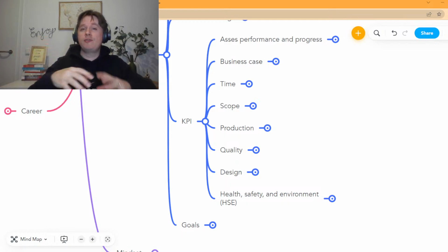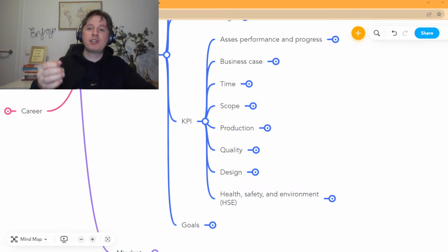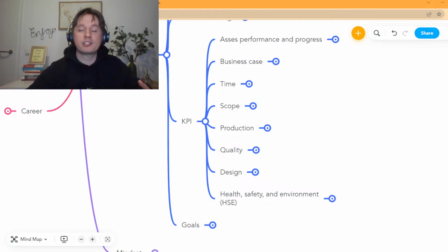And again, if you have a project team, the bare minimum that you have in every project team is hours. Because if people are working there, they're expending hours in the project, and that's a cost. Then you need to have this as a bare minimum cost KPI there. And the other one is time.